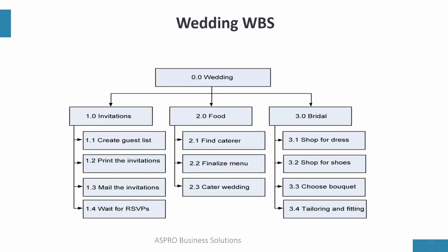So let's look at the WBS. And there are 3 ways of creating a WBS. The first one I've mentioned, use the deliverables of the project. That's one way. So these are deliverables: food, invitations, rider, and we can sign off on them.